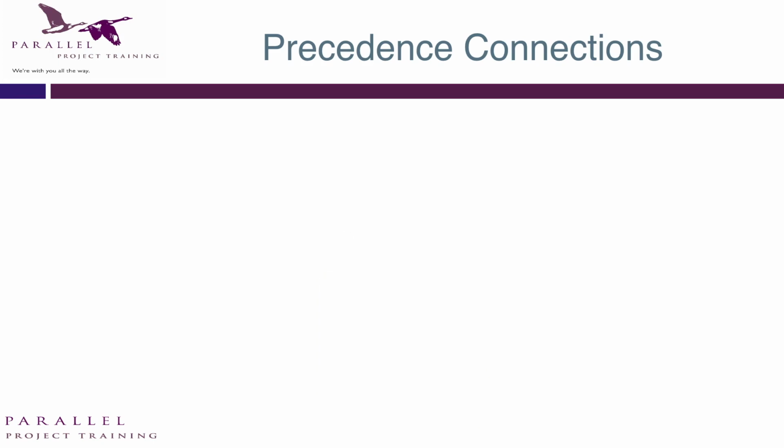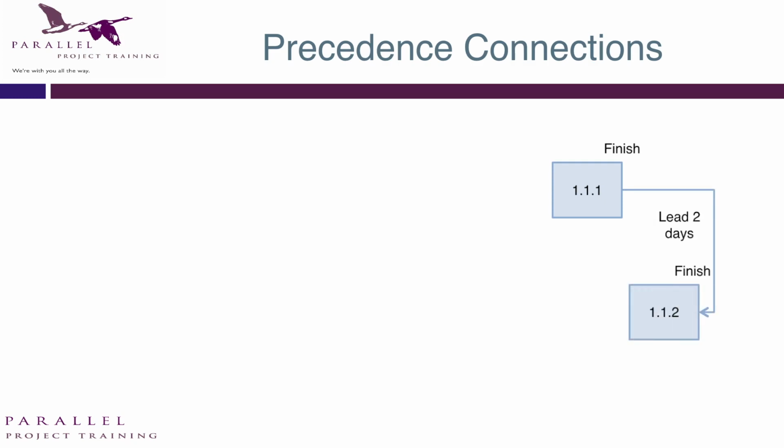When can you finish? Well, that's a finish relationship. When can you put the last pipe in the trench? Well, you can't put the last pipe in the trench until you finish the digging. So the finish of the pipe laying is dependent upon finish digging the trench.